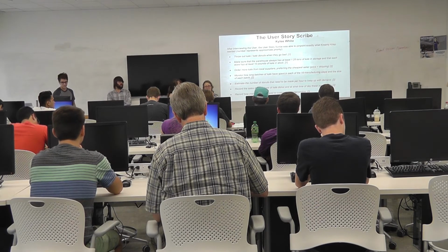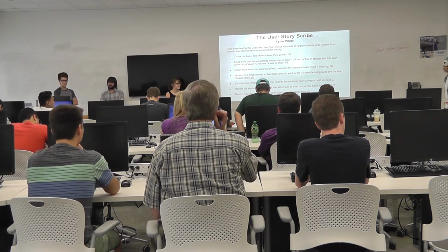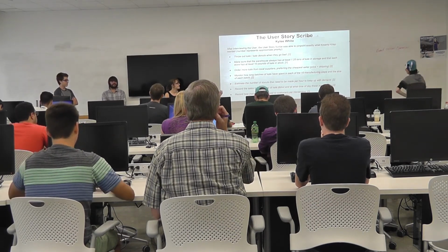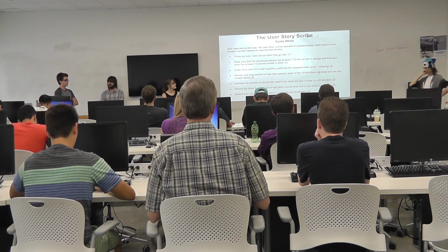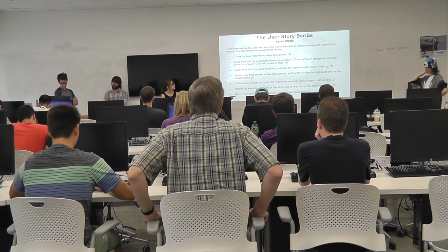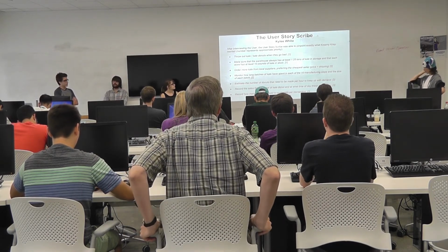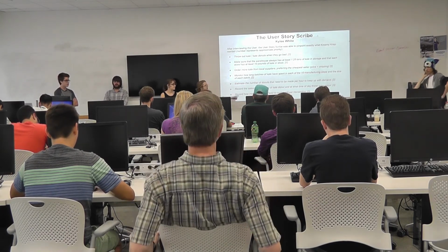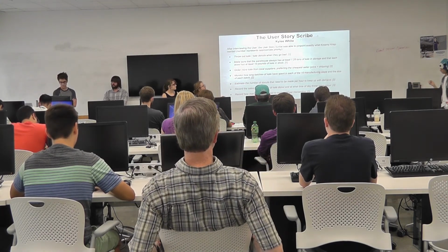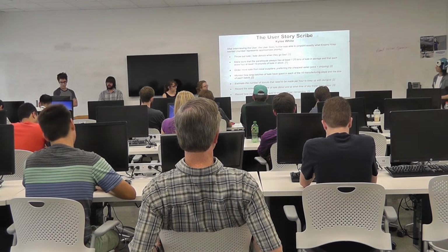Alright, so I met with Candace and wrote down all of what she wanted for my company, so that she could understand what we were doing and my company could understand what we were doing. But instead of creating my own priorities for these tasks, I asked her what the priorities were, what she needed done first, on a system of 1 to 5, with 1 being the highest and 5 being the lowest.